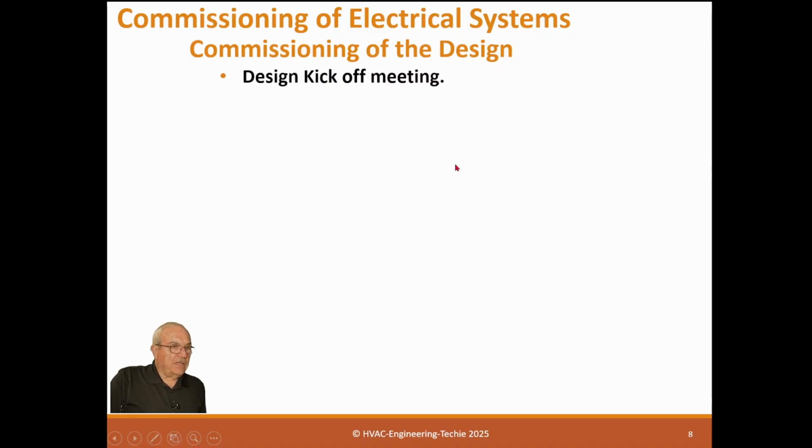Commissioning of the design. Okay, let's go through how you commission electrical design. You should have a design kickoff meeting, and normally I have one that includes all the systems in my scope of work, so it would include all the engineers from those scopes of work, because all the things are similar, but we go through each discipline separately and review the basis of design that the engineers provided.